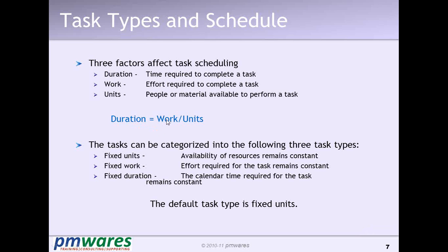That's the message for MS Project. So if you provide 2 units, it doesn't know whether I changed duration or work. If you have checked effort driven, it means work is priority, so it will change duration. If you have unchecked effort driven, it says that duration is the priority, I will change the work, so it will change the work. That's the difference.